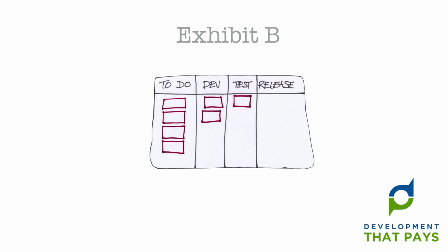What about this one? Most of the cards are to the left, so it's most likely that we're looking at a Scrum board and that we're looking at the early stages of a sprint. If this is a Kanban team, or if it's a Scrum that's in the late stages of a sprint, then something is very wrong. As before, not too many cards on the board, not too many cards in any one column, so again, I'll give this one a clean bill of health.